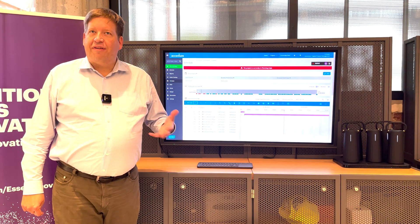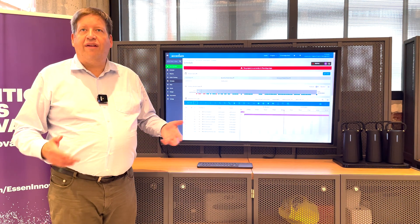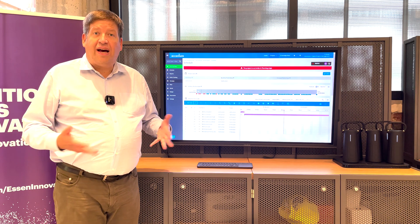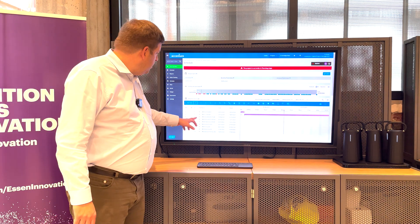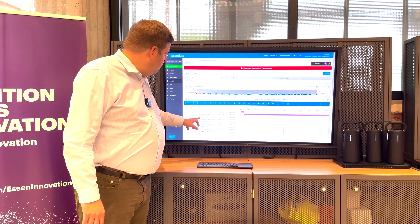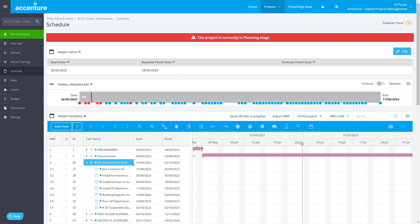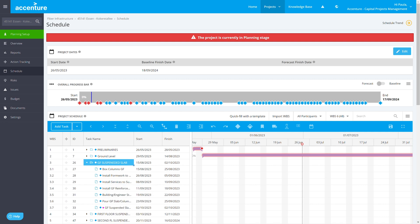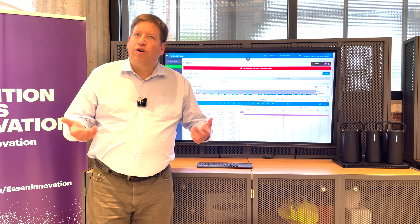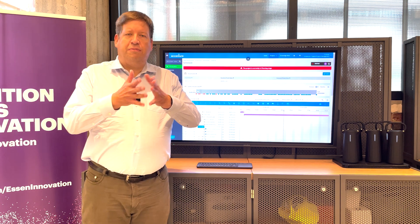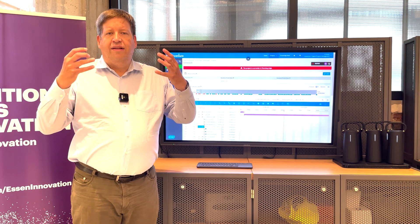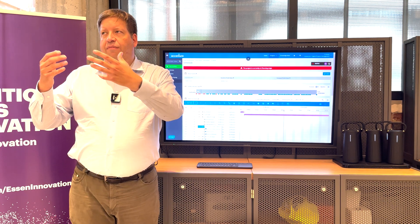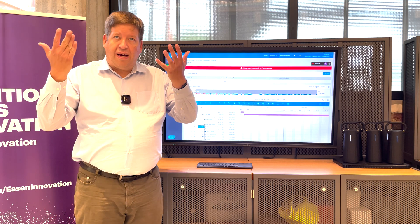It starts with a schedule, which basically says when something is going to happen, the main milestones and so on. Anybody who has the respective access rights can then directly, for example, on every of these steps here, say that I want to make this a project milestone, a portfolio milestone. From an activity, they're saying this is an important milestone that I want to report to the upper layers.